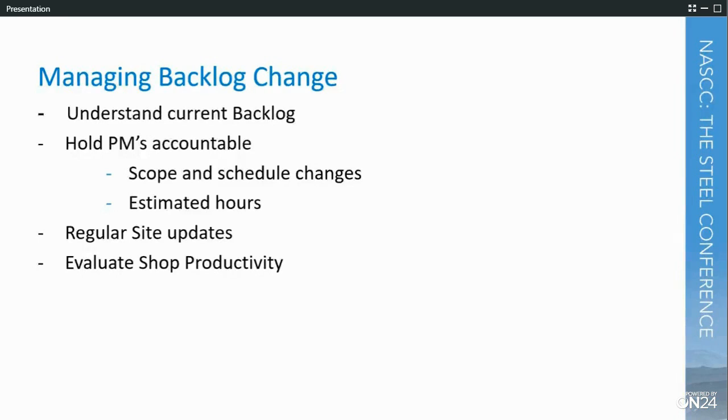And if we have confidence that that trend's going to continue, then we'll modify our scheduled hours and reduce those by 15%, because now we know that we have extra capacity that's going to come, and that's also going to allow us to respond to change better. If we look at our backlog and we don't make any modifications for how our productivity is trending, we might look like we're really busy and we don't have any holes. But if we update it for the real-time productivity improvements or when we're running over, then we can really have a better view of, hey, we actually have a hole here, or we have more available time.